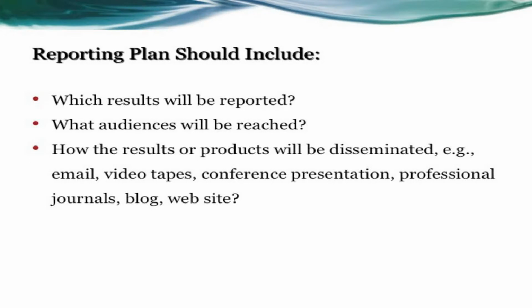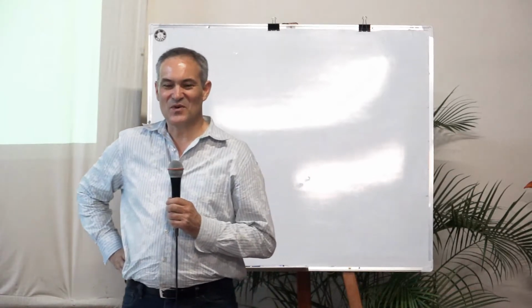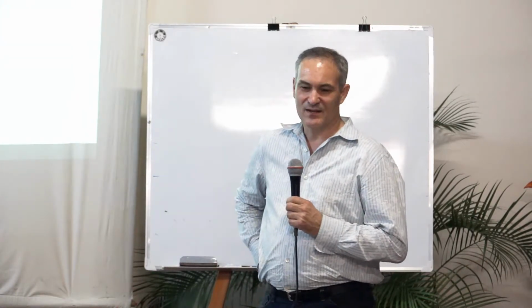When we talked about our evaluation plan, we also have project reports that we're going to have to do along the way, and so we need to plan time for those to happen. And this is one area where most projects don't plan time to get done. As Sylvia mentioned, she withholds funds at the end to make sure she does get a report, because most people don't plan for this. But if you build that into your proposal, they can see you thought through it, that time and effort's going to be needed to do a report.